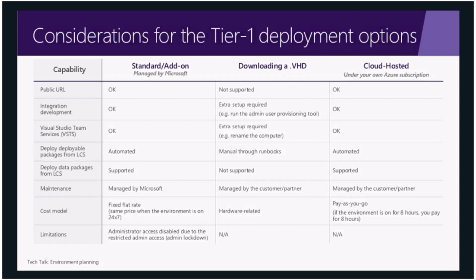For example, if you have a shop in Denver, it is good as a preparation step to go there or connect remotely, open azurespeed.com, see what the results are, and keep track of maybe the top 3. And you should do the assessment for all the stores where you're going to do the rollout to see if there's any additional action you can take.